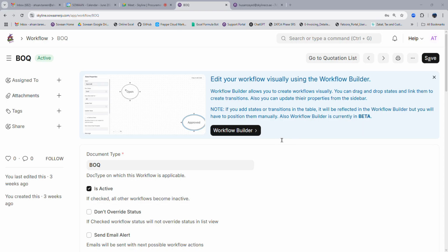This is when you want all the items to be available, and then you start working with the item table. This is the item table. Item name and unit of measurement are here, the required date for the quantity, and the virtual warehouse you must create. Osam is not going to create it. There is something to be done by the project manager or maybe somebody like Hammam.